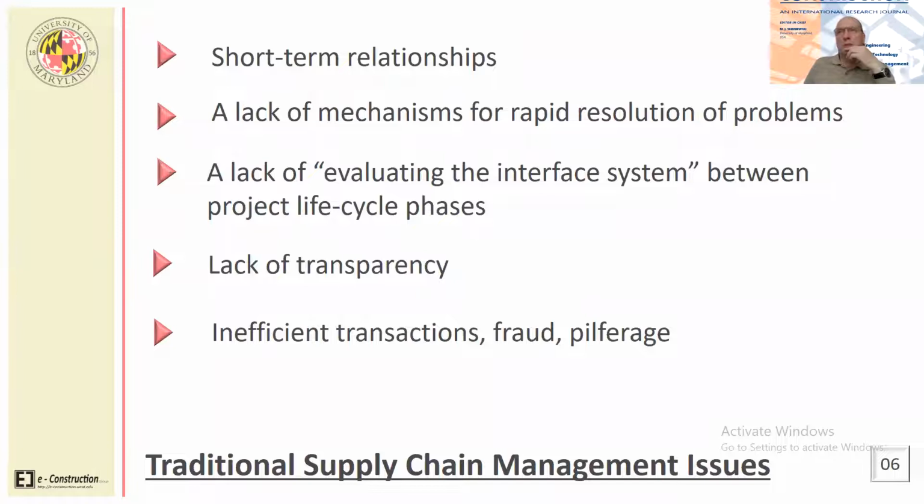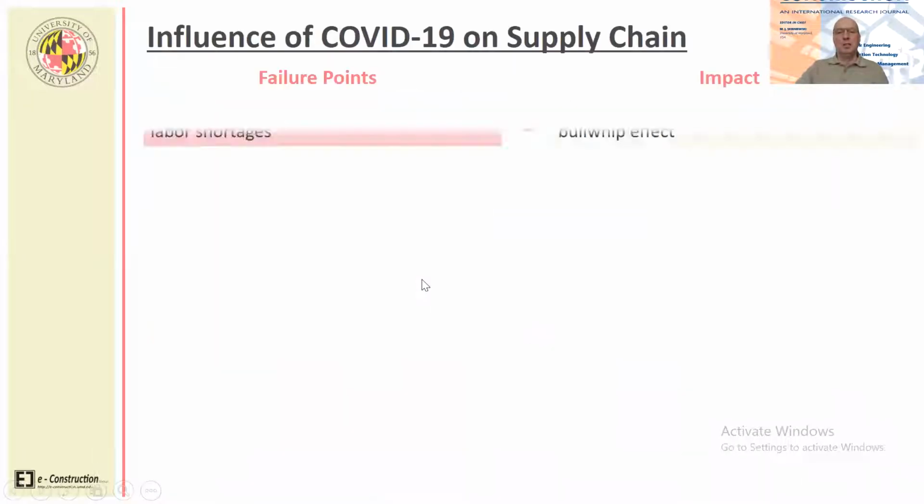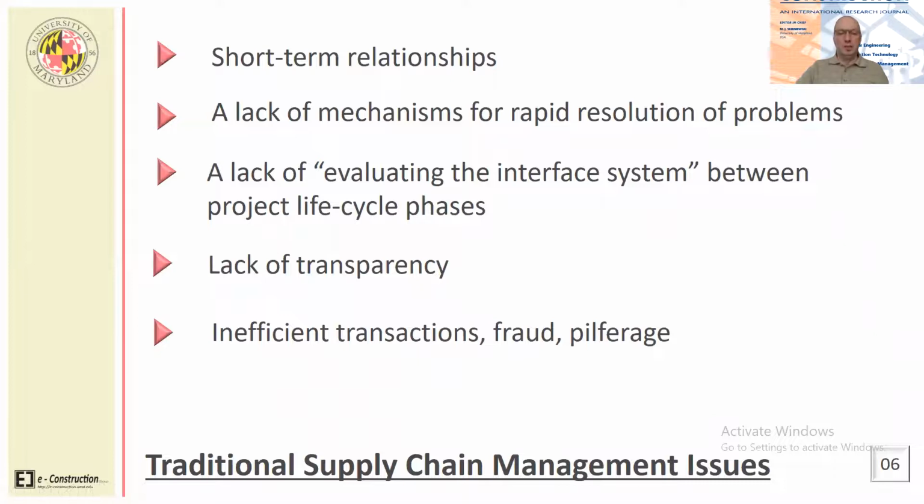There are, of course, solutions to that: barcoding these tools and check-in, check-out systems. And some unions actually require workers to purchase their own tools, and they get reimbursed on a gradual basis for these tools on an amortization basis. But it's never completely easy. So the supply chains have to really deal with it.